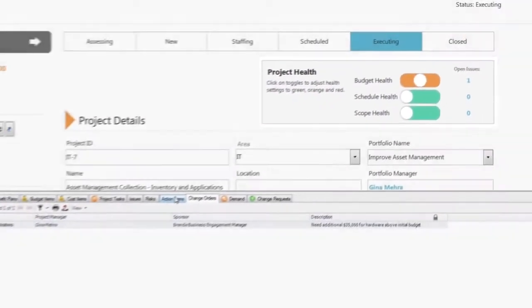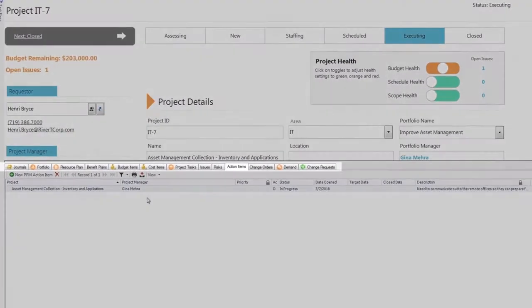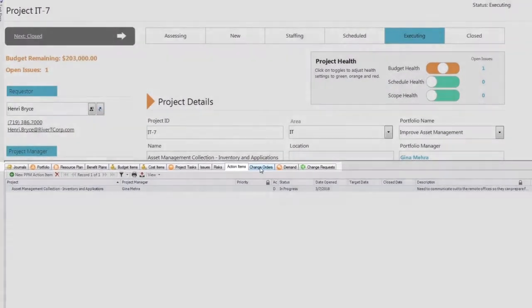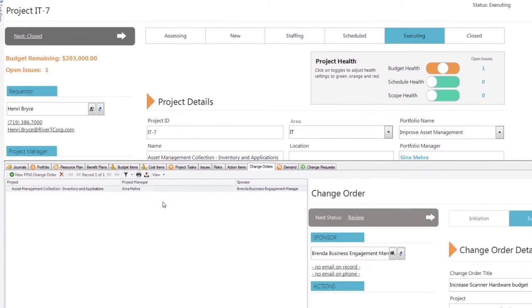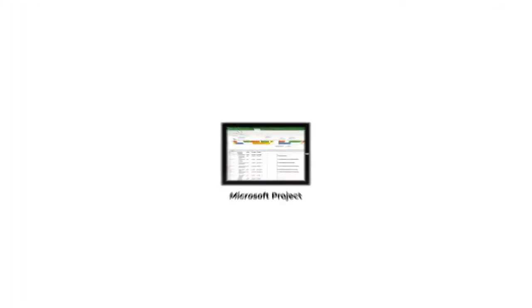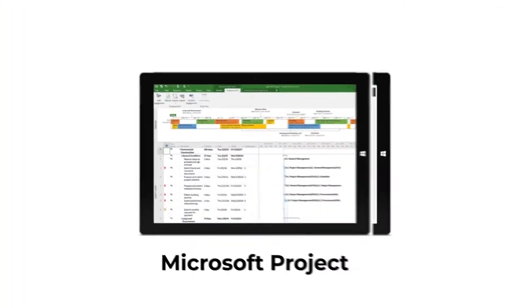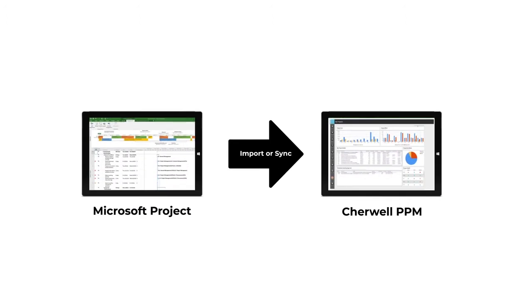Items and actions that are most pressing are presented to the PM in prominent widgets. The work breakdown structure can be created and managed within Cherwell PPM or within MS Project and imported and refreshed periodically.